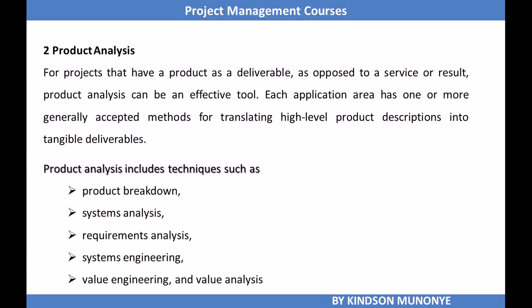Each application area has one or more generally accepted methods for translating high-level product descriptions into tangible deliverables. Product analysis includes techniques such as product breakdown, system analysis, requirements analysis, system engineering, value engineering, and value analysis. All these are aspects of product analysis.